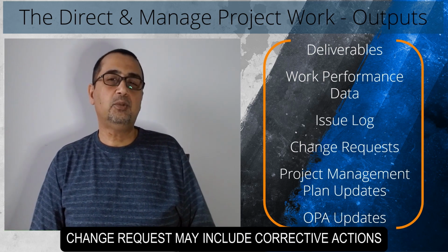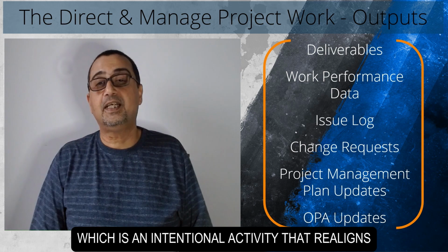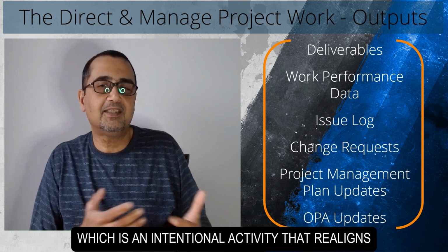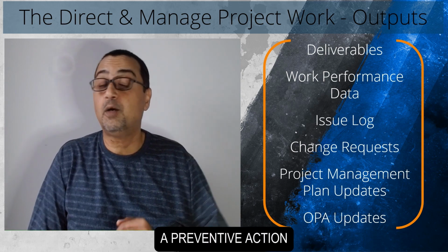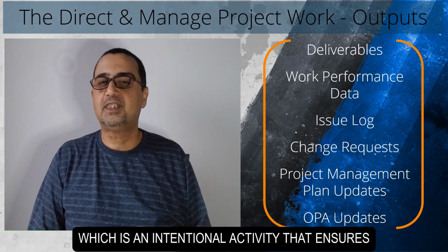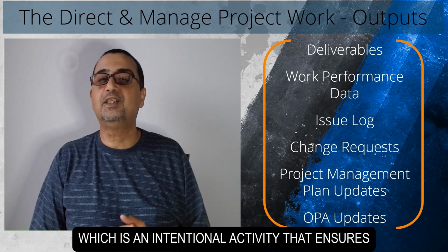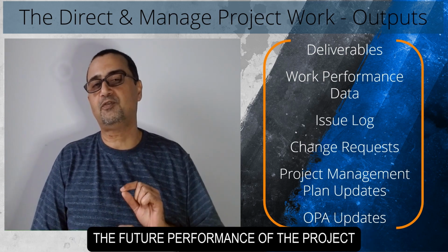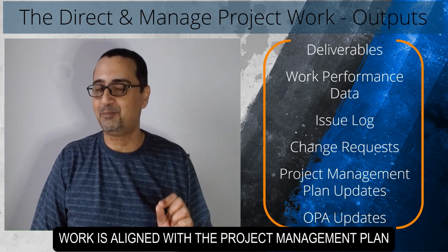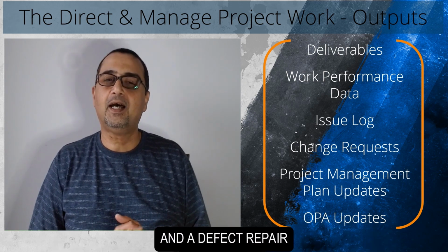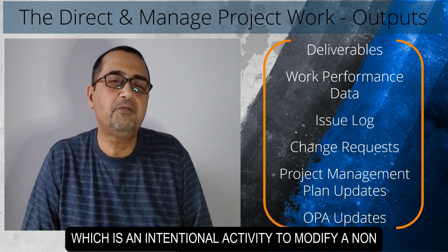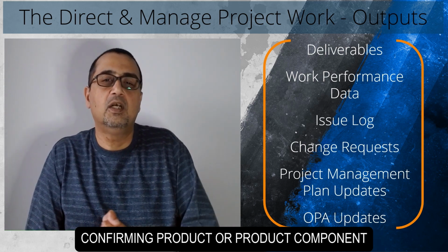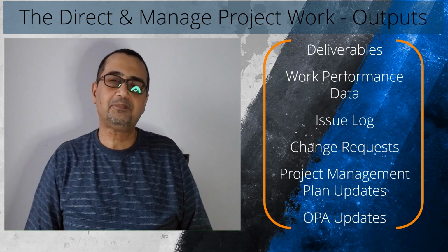Change requests may include corrective actions, which is an intentional activity that realigns the performance of the project work with the project management plan. A preventive action, which is an intentional activity that ensures the future performance of the project work is aligned with the project management plan. And a defect repair, which is an intentional activity to modify a non-conforming product or product component.